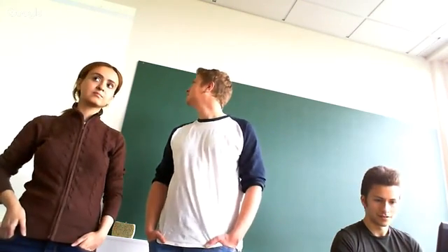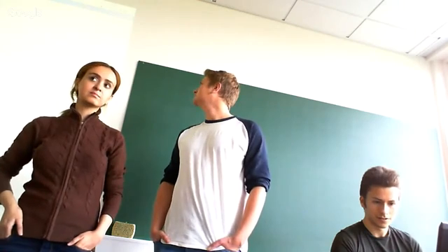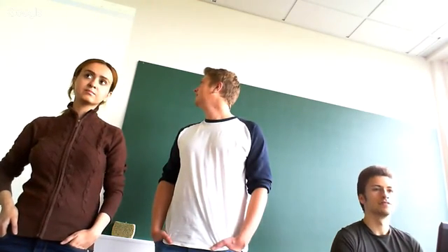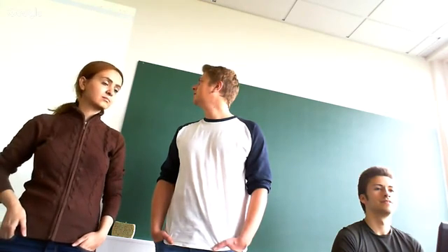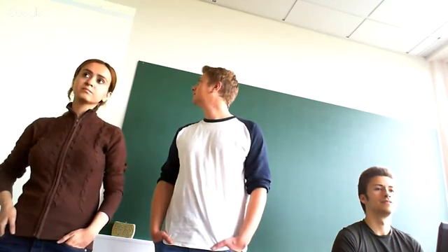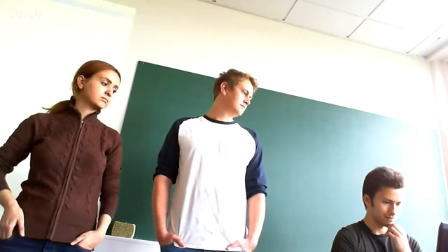My question there is, did you work on issues that are not recorded, or is this really the amount of time you spend? Because what we've seen before is that sometimes you don't make tasks for learning new technologies or investigating. That's the need that it's hard to see and it's hard to learn how much you will take. So the question is, is this all the work or are there activities, tasks that you didn't log here?